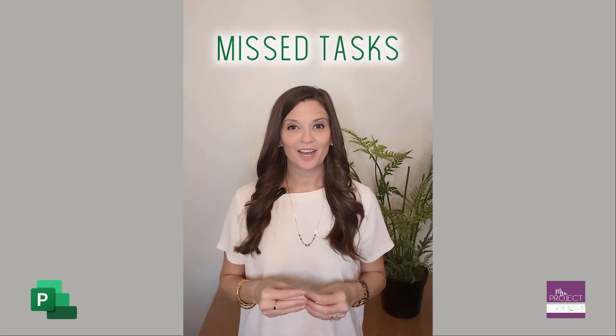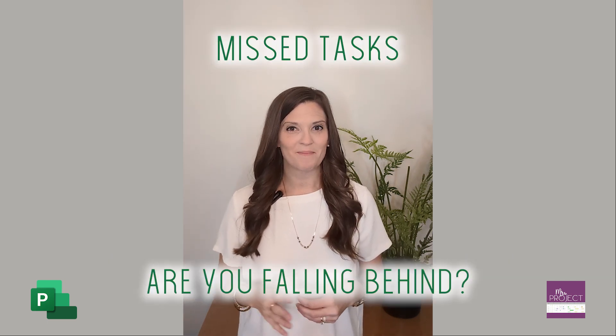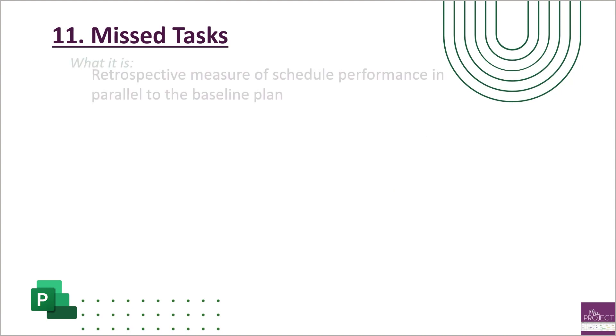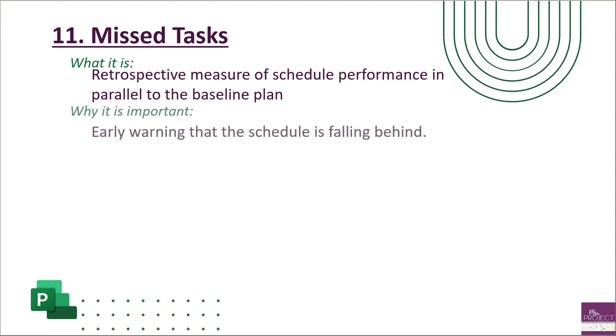The missed task metric tells you if your schedule is trending behind. It's part of your earned value where you're looking at your baseline plan and your forecast plan and comparing them. This is a retrospective measure of schedule performance. Why it's important is because it serves as an early warning sign that your schedule is falling behind. You want to look at this as an early indicator because this one is a little bit sensitive.